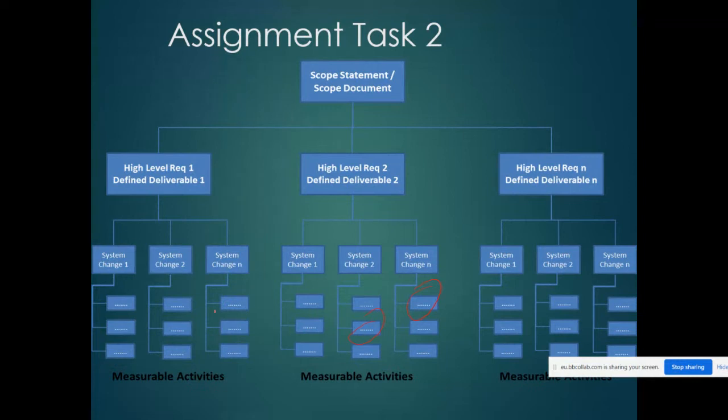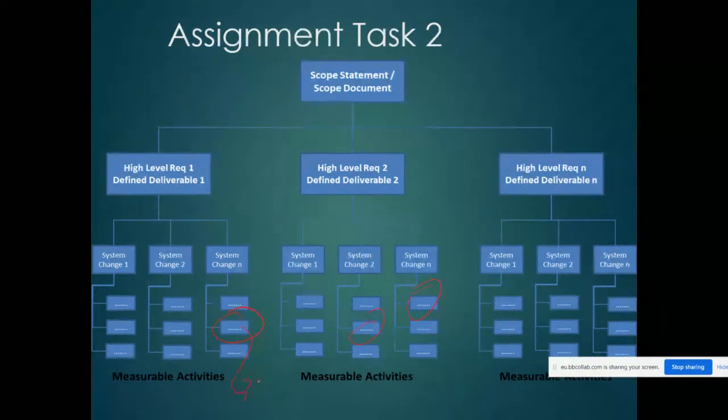They're measurable. In other words, when you say meet with the architect to finalize the design, that means that we know for that activity, meet with the architect, that's going to take 3 hours, a 3-hour meeting. Therefore, it's going to cost a 3-hour meeting with the architect and whatever else, and transport to the venue, whatever else. That might come out at, say, 6,000 Rand for that specific. We know that that's going to cost 6. And that might cost 3,000 Rand, and this might cost 2,000 Rand, which means if you add those up, 6, 7, 8, 9, 10, that's it. This one here is going to cost 11,000 Rand.